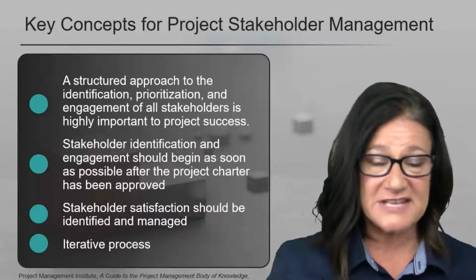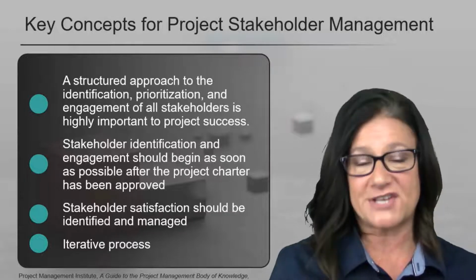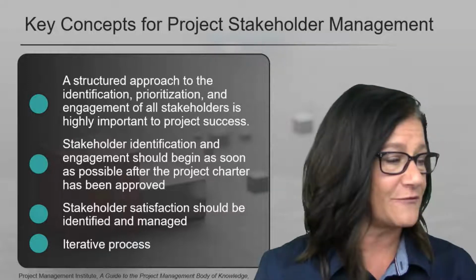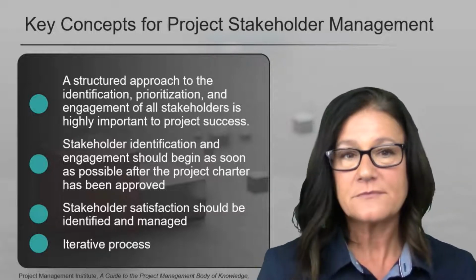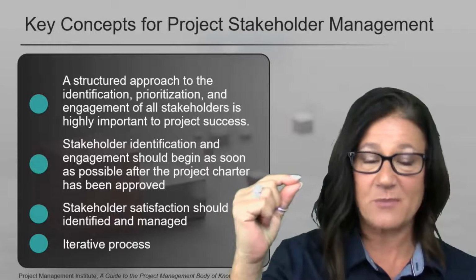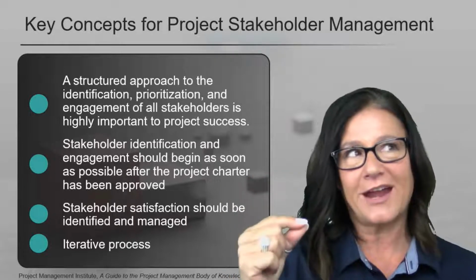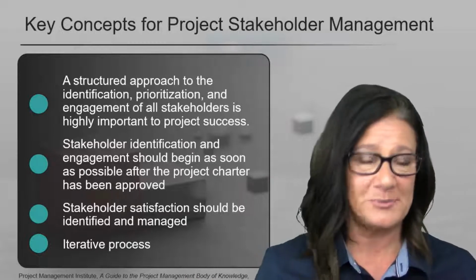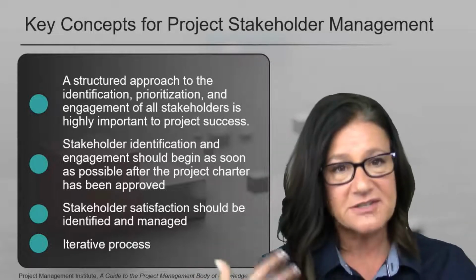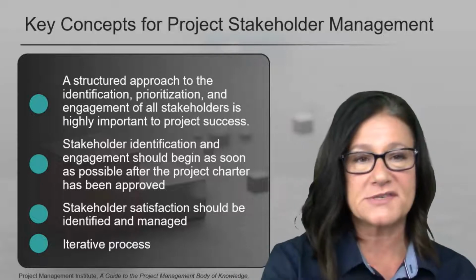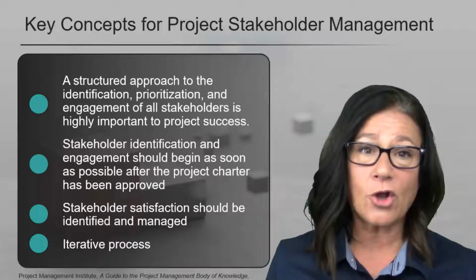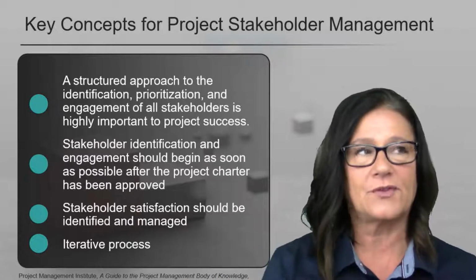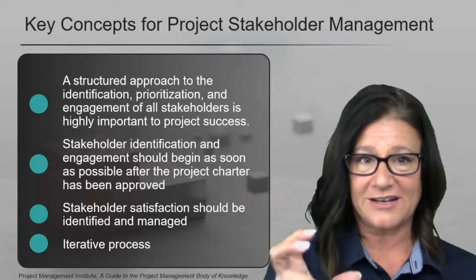If you look down the left-hand side, those are all knowledge areas: integration, scope, schedule, cost, etc. All the way down at the very bottom, you'll see stakeholder. Somewhere in the middle, you see resource management, right? And the reason why I gave you that now is to cordon off. Resources are people, equipment, and materials, but that's your team, materials and equipment that we plan for and so on. On the other hand, stakeholders, you'll see identify stakeholders and plan stakeholder engagement, those kinds of things. So they are separated out.